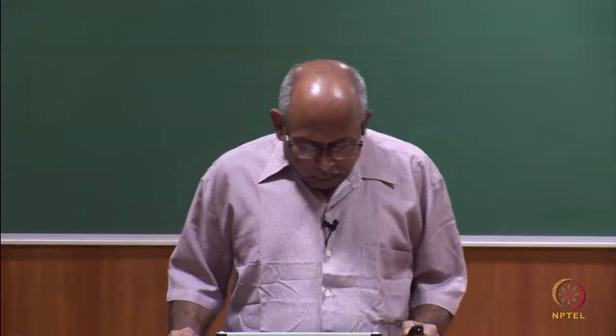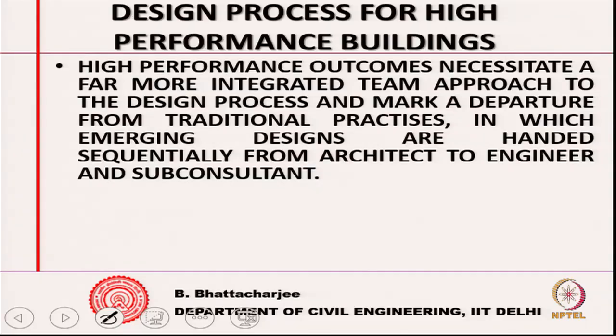Okay. So, a high performance outcome necessitates a far more integrated team approach than the conventional design process, and marks a departure from traditional practices in which the emerging design is handed sequentially from architect to engineer and sub-consultant.